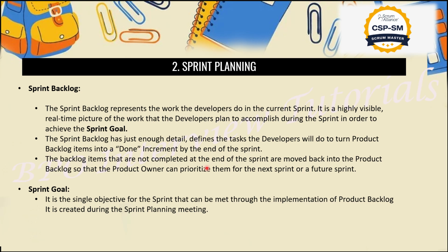Sometimes situations occur due to technical or any other issues, cost or whatever it is. Some work will not get done in that particular sprint, so we will not throw it away, basically, in the sprint meeting or the scrum meeting. Everything will be decided, like let this work go to the product backlog, and the product owner will decide how to prioritize the work.